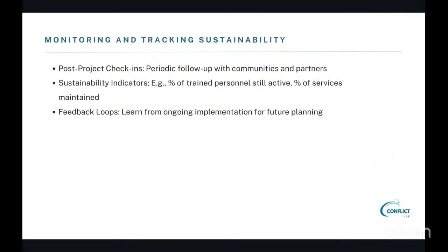Then you have the post project check ins, sustainability indicators, and feedback loops. Again, this will depend on how comprehensive your proposal is, if they're asking for it or not. Usually, I didn't see it a lot, but post project check ins, they will ask it in M&E mostly. Where you have to show that, okay, after the project ends, we will go after, like as I mentioned, 6 months later, you take another survey of farmers to see if there was income increase for their training because of the training or something. So you can add that in your M&E.